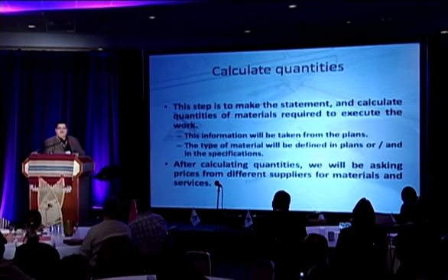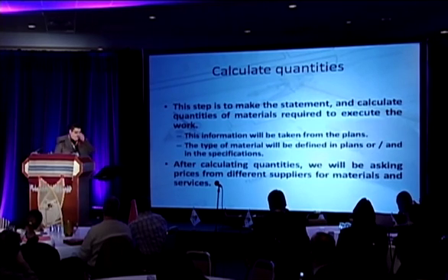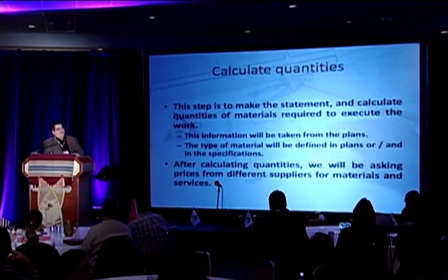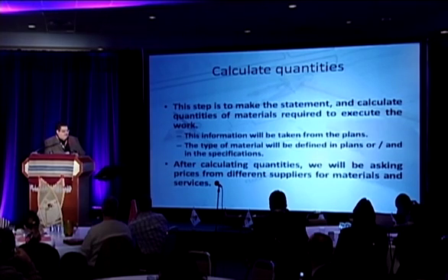If they don't specify how you're going to get that material or where you're going to get it, it's always a good thing to contact the client and say, have you identified the borrow pits, the quarries where this work is going to be done? It's better to do it that way. I know some companies prefer to wait and go into a claim process after, but you're taking chances. It's better to have all the information at the bid stage.